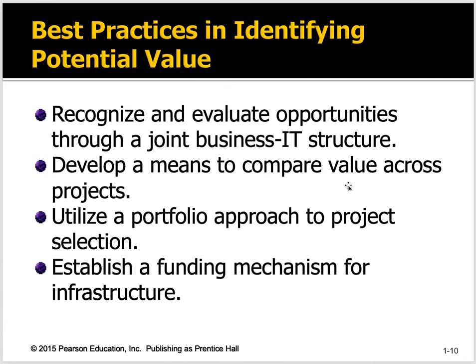You want a means of comparing value across projects and utilize a portfolio approach to project selection — that's what most companies do now. You don't allow people to go out and buy little computer programs themselves. You want IT spending on projects, apps, new software, and enhancements coordinated at the central level, prioritizing those that give the most return on investment and have the broadest appeal across an entire company, especially if you're a multinational. You also want to establish the funding mechanism — to me, it's a parallel structure to the capital budget planning process.